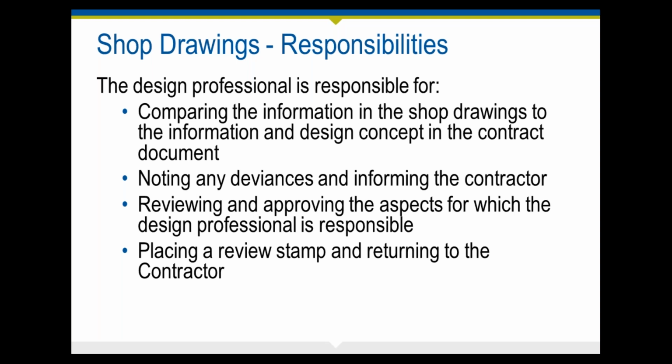So, for example, if your contractor submits to you their safety plan, then they want to send it to you and they ask for you to review it, unless that is something that has been asked for and you're providing that particular service, you certainly don't want to be doing that type of review because it's not your responsibility, and it may be an attempt by the contractor to kind of spread their responsibility around. So by your actions, you don't want to be caught in the position of having reviewed documents that weren't part of their contract.